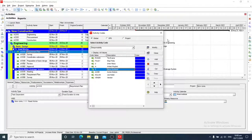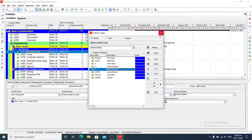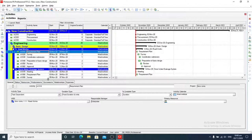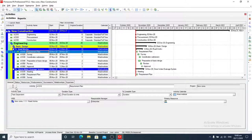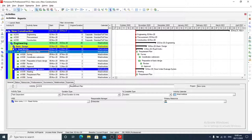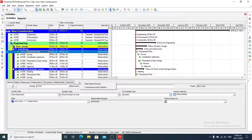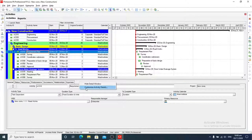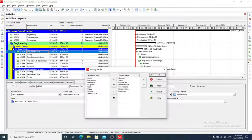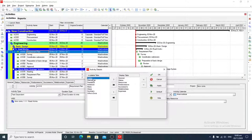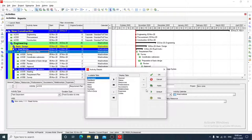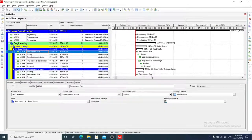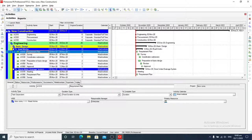So now we are going to add the code option. In activity details, the code option is missing. So first we will customize it. We will right click on this space and customize activity details. Here is code and we will add it and click OK. So here is the code option.